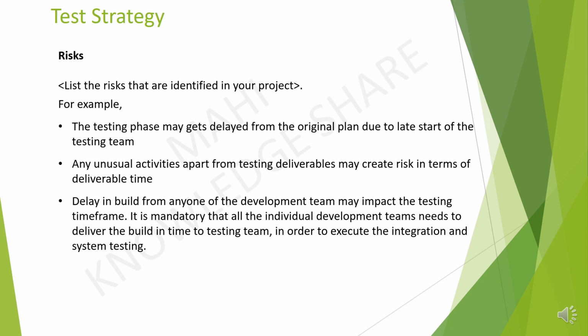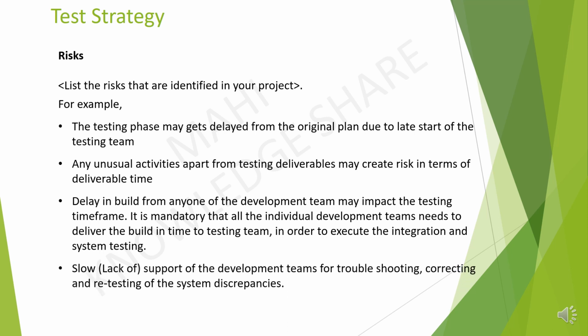It is mandatory that all the individual development teams deliver the build in time to the testing team in order to execute the integration and system testing. Lack of support from the development teams for troubleshooting, correcting and retesting of the system discrepancies. Test environment instability would delay testing. We provided only a few risks here. We will share a detailed presentation on risk and mitigation, assumptions and dependencies later.